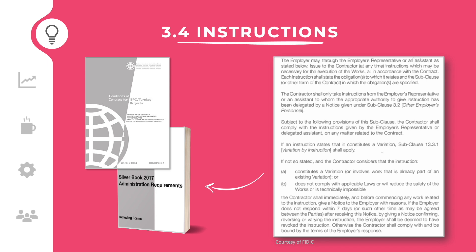Be aware that only an authorized employer's representative or an assistant with the appropriate authority can issue instructions. The contractor shall comply with an instruction. The employer's representative can instruct a variation. The contractor shall immediately notify the employer's representative if they believe that the instruction constitutes a variation or they have other objections. If the employer's representative does not respond within seven days, then the instruction is deemed to be revoked.